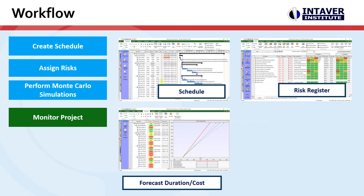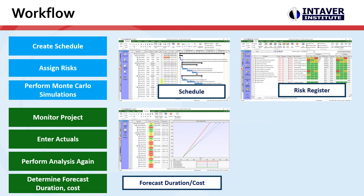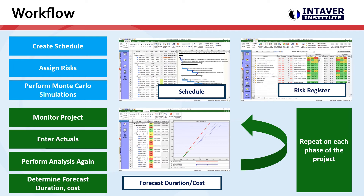Once we're underway, we'll monitor the project and enter the actuals — which can be done in a third-party tool like Microsoft Project or in RISQ Project — and then perform the analysis again. From that, we determine forecast duration and cost, and the estimate at completion taking into account the actuals. This is an ongoing process at every phase gate or project review: monitor, enter actuals, and perform the risk analysis again at each phase.